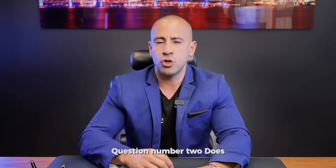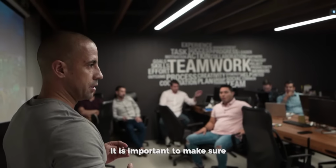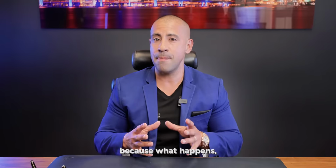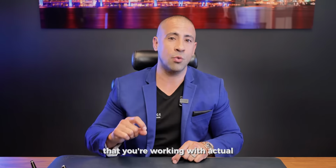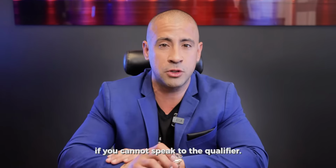Question number 2, does your business have a license and insurance? If yes, who is the qualifier and will I need him? It is important to make sure that the qualifier is part of the process, because what happens is many contractors use other people's license and they have no liability in your project. So you want to make sure that you're working with the qualifier and he's part of the team. This is a huge red flag if you cannot speak to the qualifier.